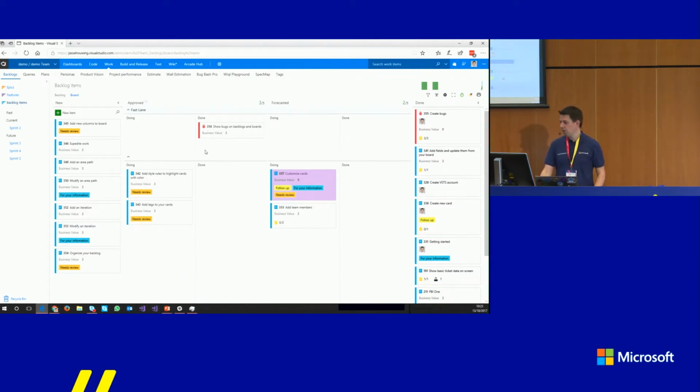That's easy to do. Another thing that's quite easy to configure now is to have a doing and done. So for approved, which is whether or not we're readying our work, if we're doing approved, then we're working on making sure that we can actually start doing this. If you move it then to done, it's like, all right, this is approved to actually be picked up in the next sprint. Same you can do with forecasted. Done means the developer, the tester, and the people from the team think that it's actually done. But once you move it from forecasted done to actual done is when the product owner looked at it and says, yeah, I don't see anything stupid anymore.